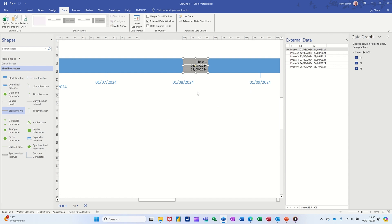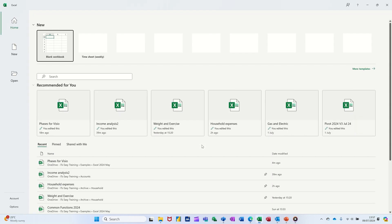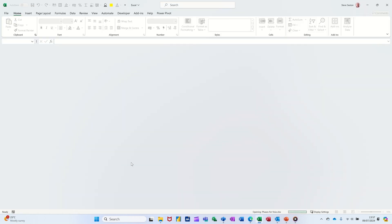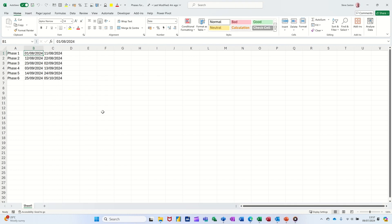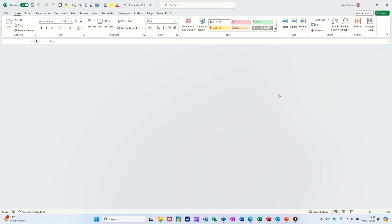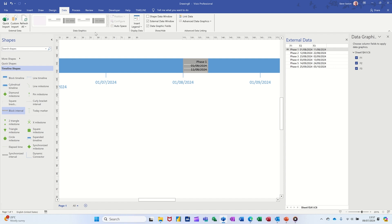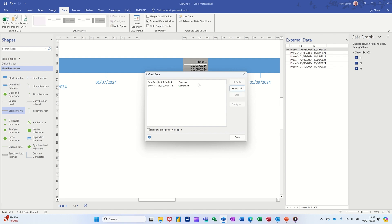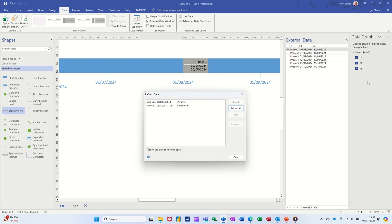So that's picking up the first of August to the 11th coming off the Excel data. Now if I open that Excel spreadsheet and change that first of August date, let's see what happens. I'll go the 10th — 10th of August 2024, everything's moved, it's a 10-day task now. Back in Visio, nothing's been picked up yet. Go to Refresh — it's gone to the 10th and the 20th. So this is updating. It's the data graphics that update, not the information in the boxes when you first drag them on.